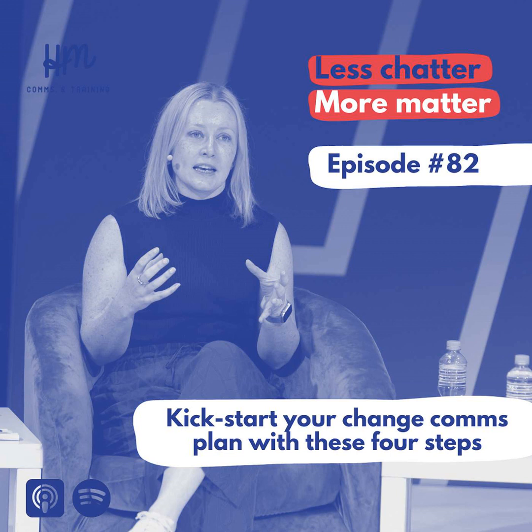Now, our change leaders are often team leaders or senior leaders within a particular department, and you are going to need them to do a bit of the heavy lifting in the change and comms process. And finally, the bottom right is high impact but low control. And these are typically our end users. They're often team members, although they could be customers as well. So part of the scope is understanding who all your audiences are and where they fit into those quadrants. Then we go through those audiences one by one and we ask questions like, what's changing? Why? How is this different to their current state?